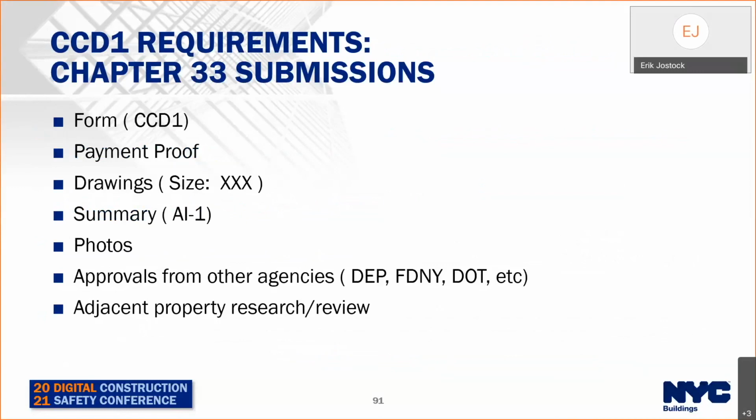These instructions sort of come from the form. The form has to be completed. This is what we want to see in your submission. You're going to have to submit the invoice or the proof of payment. The drawings can't be any larger than 11 by 17, and everything needs to be submitted in one flattened PDF. We can't have multiple attachments. We can't have documents that are 24 by 36 or larger. Everything has to be no larger than 11 by 17. We don't have the resources to spend as much time as we want on these, so we need everyone to get everything in order before it's submitted for our review.